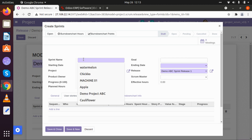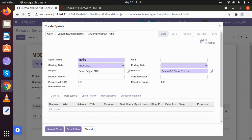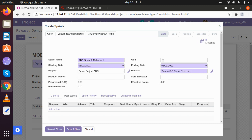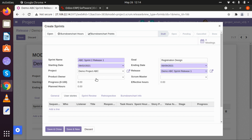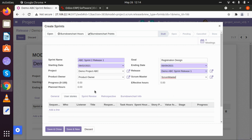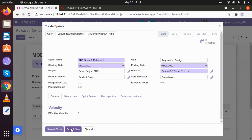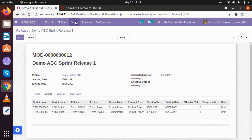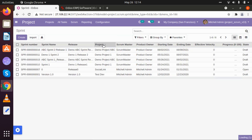Let me create another sprint: ABC Sprint Two Release One. I am going to keep its starting date and ending date a week after our first release, and in this sprint we will be starting with registration design. I am keeping the product owner and scrum master as before. I have created two sprints. I am simply closing this and saving. When we look at our sprints, there will be two sprints created in that particular project: Sprint One Release One and Sprint Two Release One.